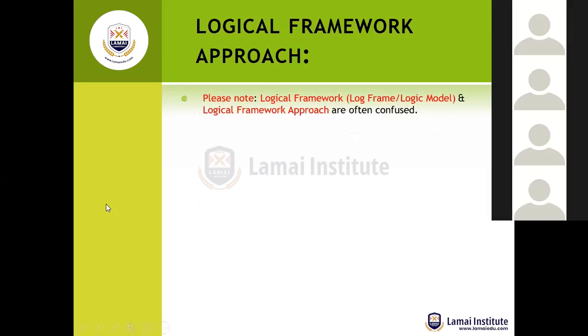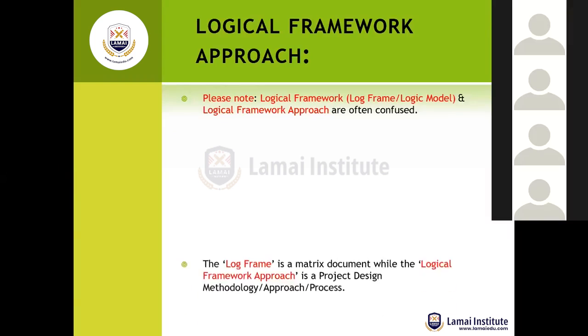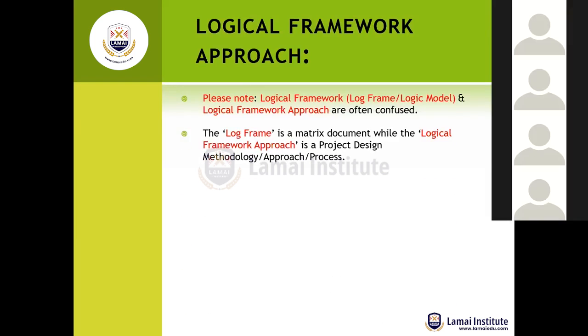Now, please note that sometimes the logical framework, which is just one of the frameworks that we mentioned earlier, that's the Logframe, and the logical framework approach are often confused. The difference between the two is that the Logframe is the matrix that we create, whereas the logical framework approach is a project design or planning process. It's important for us to see that difference, and most people are not able to see it.